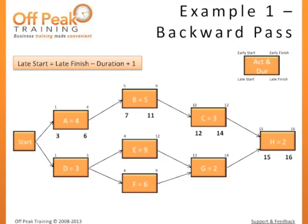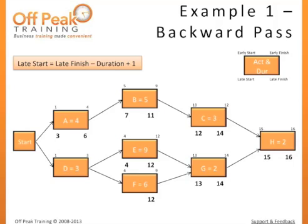Now let's calculate the bottom two paths. Since Task G is a predecessor of H, its late finish will be based on the late start of H. If H must start no later than the beginning of the 15th day, then G must finish no later than the end of the 14th day. Using our formula, late finish 14 minus duration 2 plus 1, gives a late start of 13. Both E and F are predecessors of G, so they will both have late finishes of 12. The late start of E will be 12 minus 9 plus 1, giving a late start of 4. The late start of F will be 12 minus 6 plus 1, giving a late start of 7.